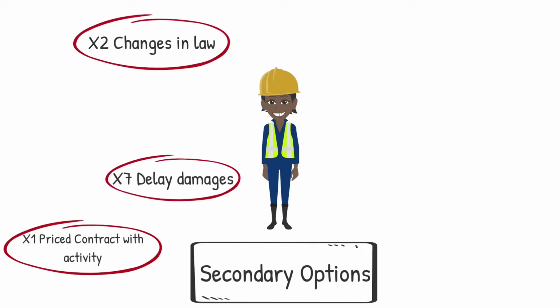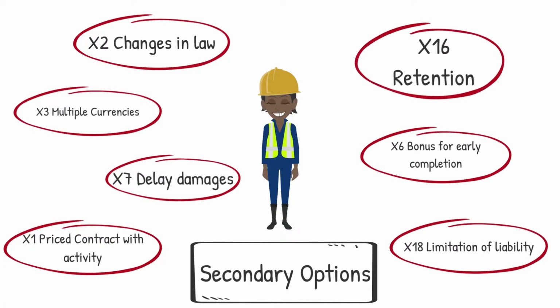And then we come into the last session, which deals with your secondary options, right? In the secondary options, you will have your X clauses, like your X1, which speaks to price adjustment for inflation. If a contract runs a year or more, there will be CPA, which means X1 will apply, right?